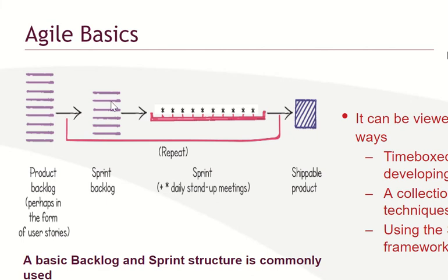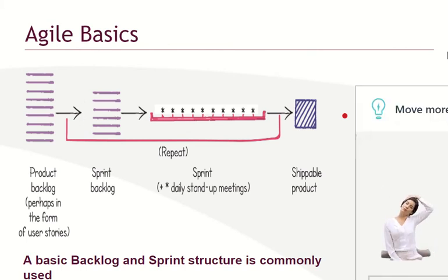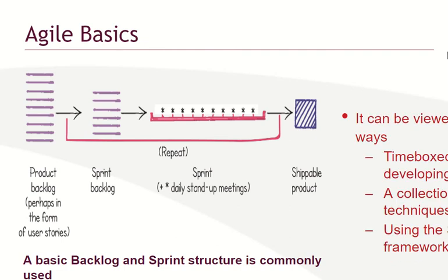A backlog here means you break down into activities. What are the activities you will do to achieve, for example, the foundation? What do you need for the foundation? So foundation is like a sprint, something that can be done in 2 weeks. Okay. Now, what are the things that will be done? How do you want to spend the 2 weeks? First week, we will do this. Or first 2 days, we will do this.